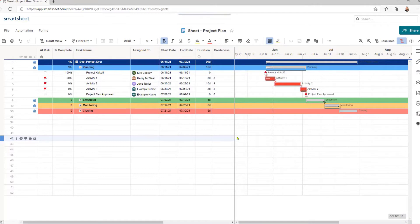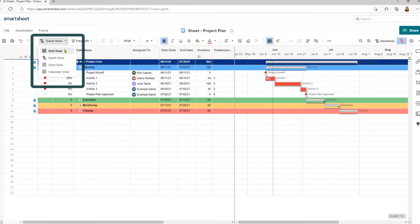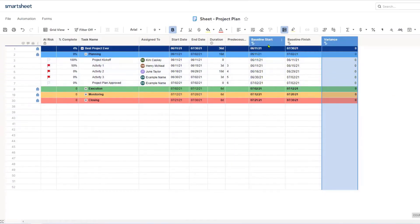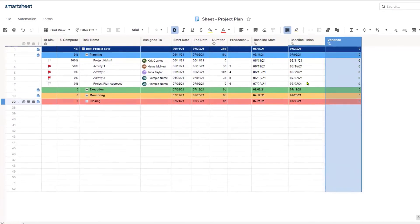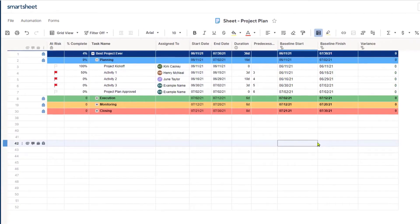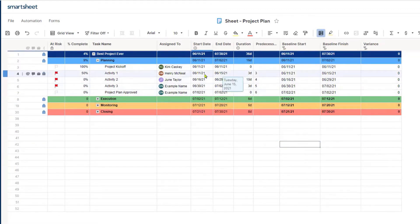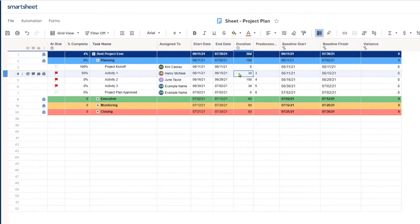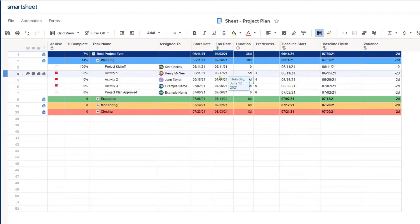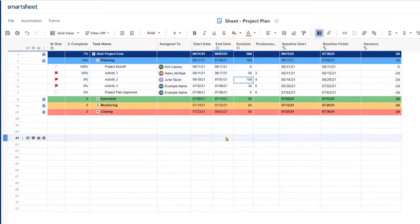What it's going to do now is add some additional columns to my project schedule. If I go back to grid view, you're going to see that I now have automated columns that were added: baseline start, baseline finish, and the variance. I don't have a variance right now because I just set it with the dates in my actual project schedule. But let's say that on June 15th we were supposed to have activity one completed, and we're only at 50%. We thought it was going to take three days — it's actually going to take five days. So I've switched that to five days, which pushed out the date to June 17th, which in turn adjusted the dates of successor tasks.